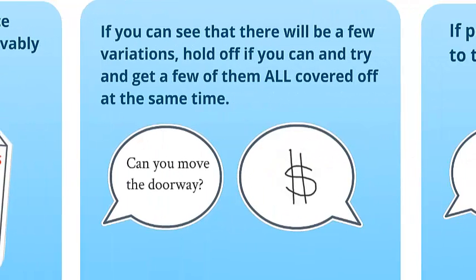You'll usually find that under a fixed price contract, there's generally a documentation or administration fee that's attached to the variation. I've seen these before at $800, and I've actually heard of it getting up to $1,200. So what you want to try and do is get a few variations done at the one time if possible, and that way you're going to minimise the amount of documentation fees that you've got to pay.